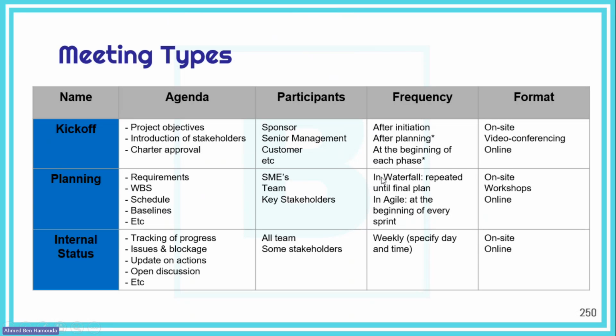But also, in some other practices, there could be a kickoff meeting at the beginning of each project phase. That happens. I personally have used that in one of my projects, in the pharma industry, and there was a sort of stage gate or a phase review. So at the end of each phase, we made a review, and then if we took a decision to move on to the next phase, then of course, we had a kickoff meeting for that next or subsequent phase.